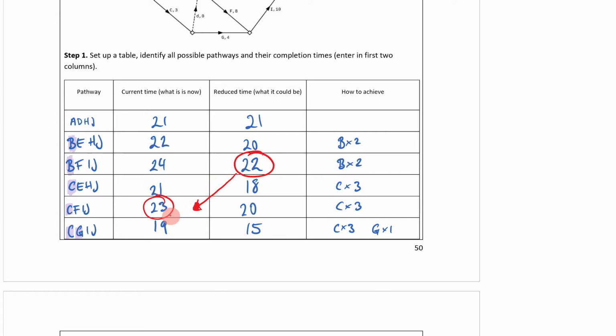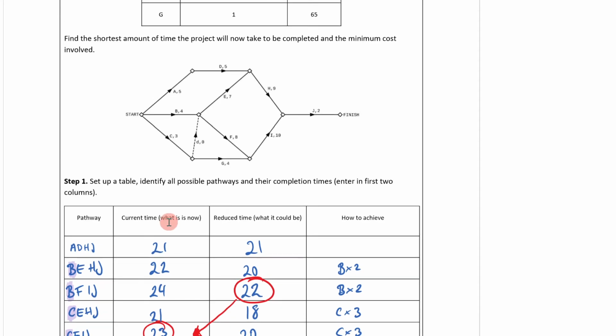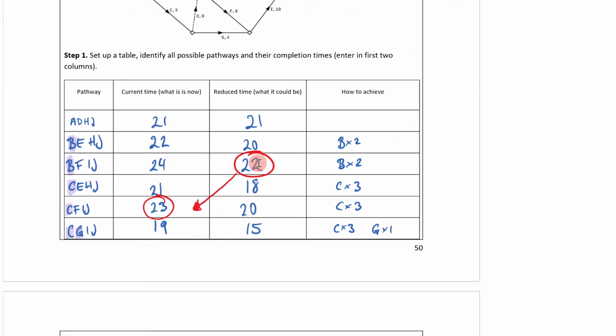Does that make sense? Because remember, no reductions have been applied here. So I've actually just created a new critical path. What I've done is go from an original completion time of 24, because remember that was my biggest number. My biggest number is 24. And it looked like I had reduced it by 2, but in actuality, I only reduced it by 1.